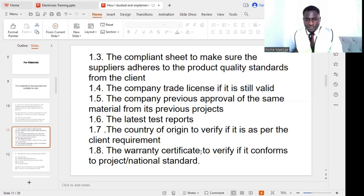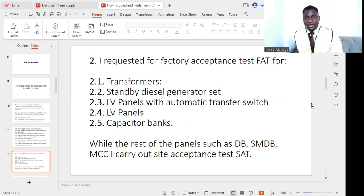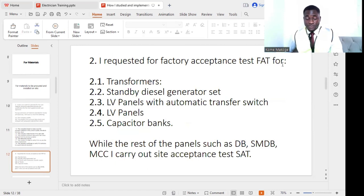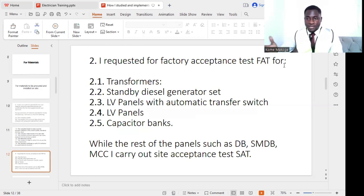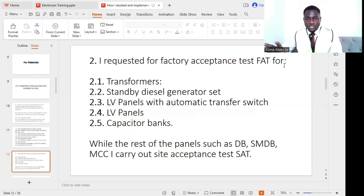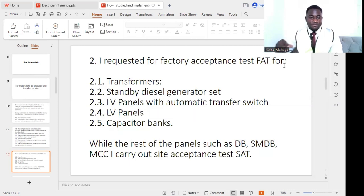The second point, after ensuring material submitters and pre-qualifications are all approved, is to request factory acceptance tests for different materials. I made sure factory acceptance tests were carried out for transformers, with the consultant invited to the factory to verify they are fit for use. The next is standby diesel generator sets — the number of generator sets to be brought to the project must also have factory acceptance tests conducted. I will make a video on factory acceptance tests for LV panels so you can understand the different procedures and sequence.